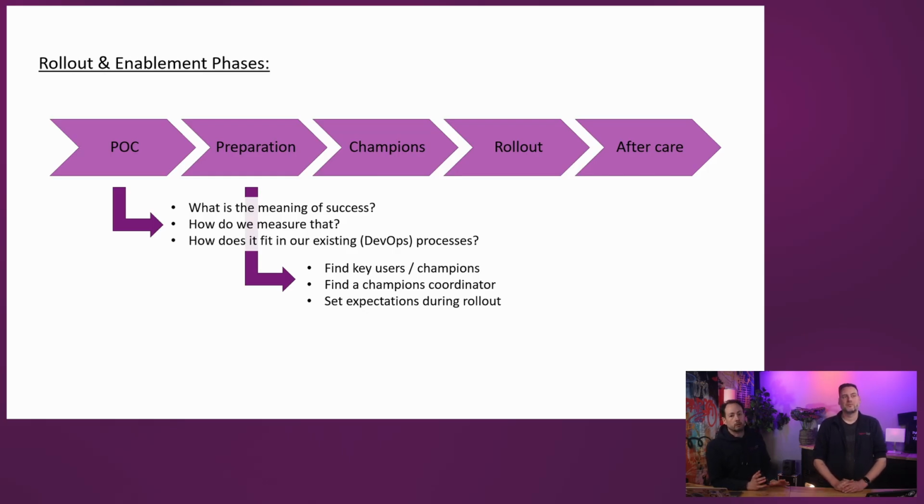And also set the expectation that they have a certain responsibility, that they will be required to show initiative, and also to reserve additional time, because a lot of times that's an issue, right? Then we get the question back, hey, how much time do you expect them to be spending on this? Generally, we say 2 to 4 hours a week, right? Yep. So make sure that they have this time reserved and they know what to do, what their role is. But they also need help.